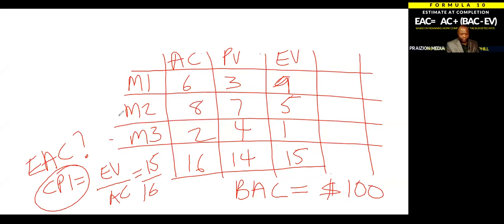Okay, well, at the top of page 265, it says the project manager's manual EAC is quickly compared with a range of calculated EACs representing various risk scenarios. When calculating EAC values, you might want to highlight that the cumulative CPI and SPI values are typically used. It's not typical, they should always be used. While EVM data quickly provide many statistical EACs, only three of the more common methods are described. And then they give it to you.